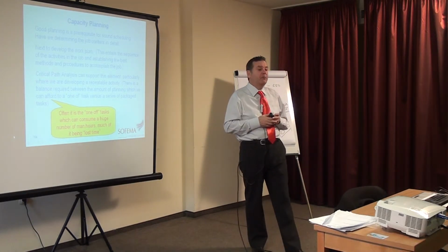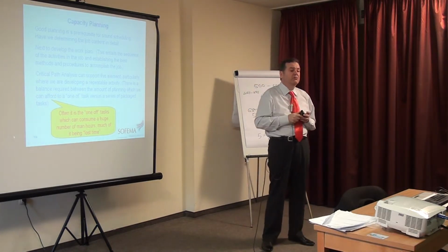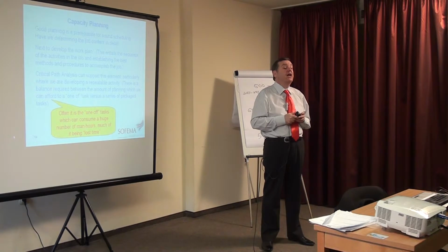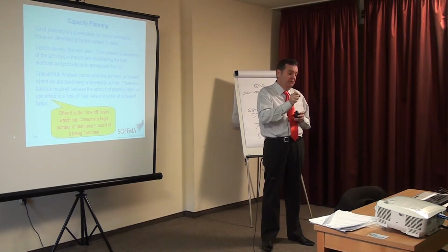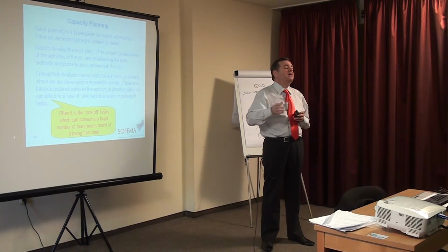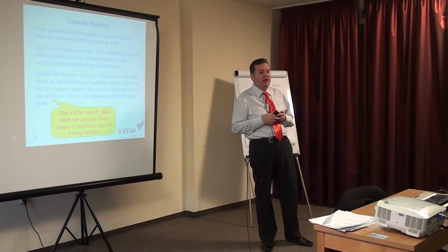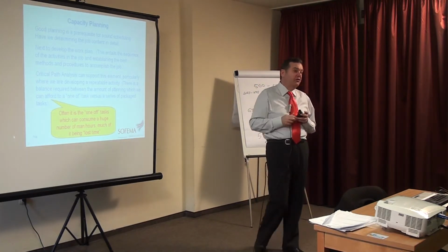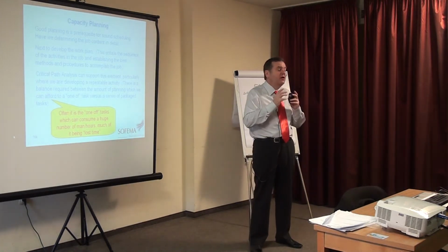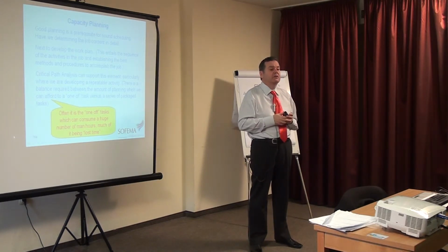So for example, the aeroplane is coming in for 3 days. We have a task that is going to take 2 days. That task, if we do not start it by at least the beginning of the second day, we're going to be late. You start that 2-day task on the 3rd day, and I can tell you straight away, without my crystal ball, we're going to be a day late, guys. How do you know? Because it's a 2-day task.